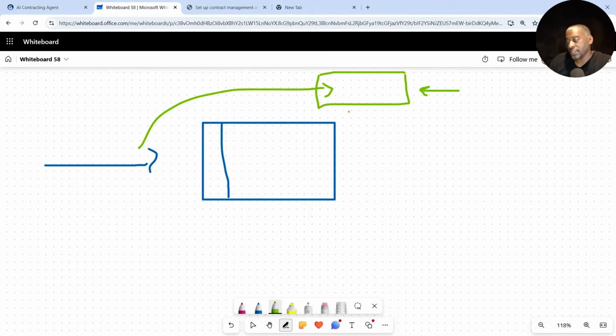We may have a meeting set up where we go through these issues lists. We rate it as high, medium, or low, with the understanding that everything high must be done before go live. Anything medium, if we've got the time, we'll address those. The low ones, nine times out of ten, we're not going to address them. So let's rank. Usually they're nice to have, or it'll be nice if we did this, but it's not a showstopper.